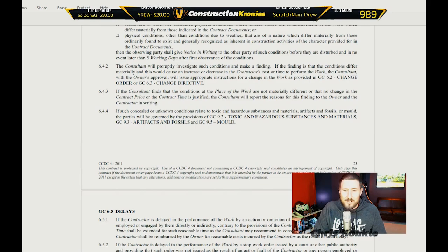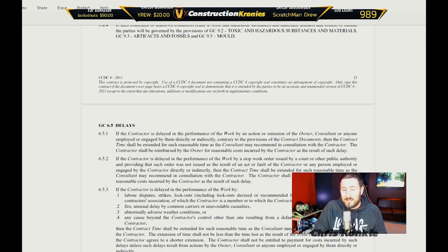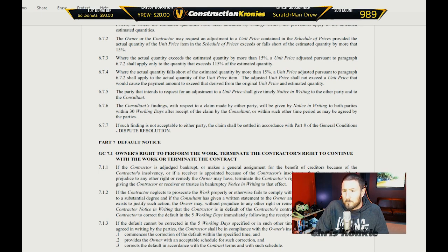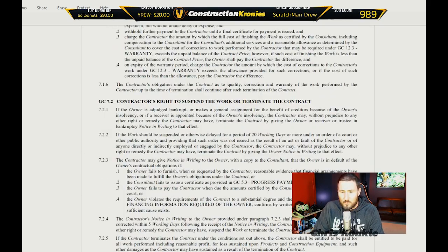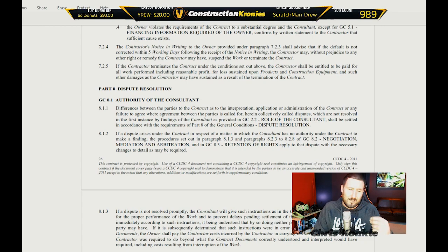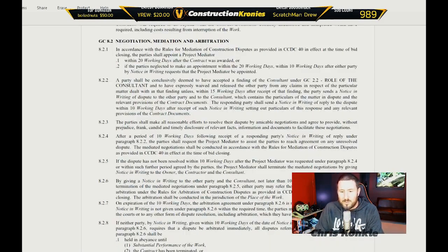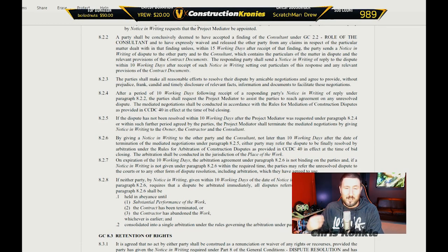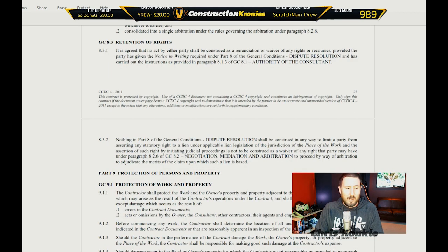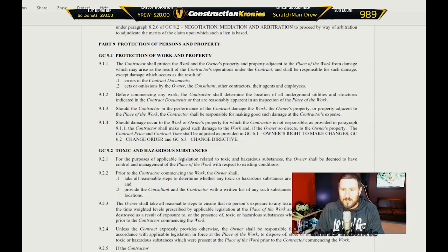Concealed or unknown conditions. Delays — so things like liquidated damages will be designated in here. Claims for change in the contract price, quantity variations, default, owner's right to perform the work, or terminate the contractor's right to continue or terminate the contract. There'll be an indemnification clause and things like that in here as well. Dispute resolution — they'll generally see negotiation, mediation, and arbitration as the routes to go. Very rarely will it go to litigation unless it's some kind of outside thing or certain rules are broken. If you have a claim, it's going to go through a process and it could be years before you get paid out. So be very careful when entering a contract — make sure you can perform the work and you have the manpower, the people power, and the money to get the contract done.